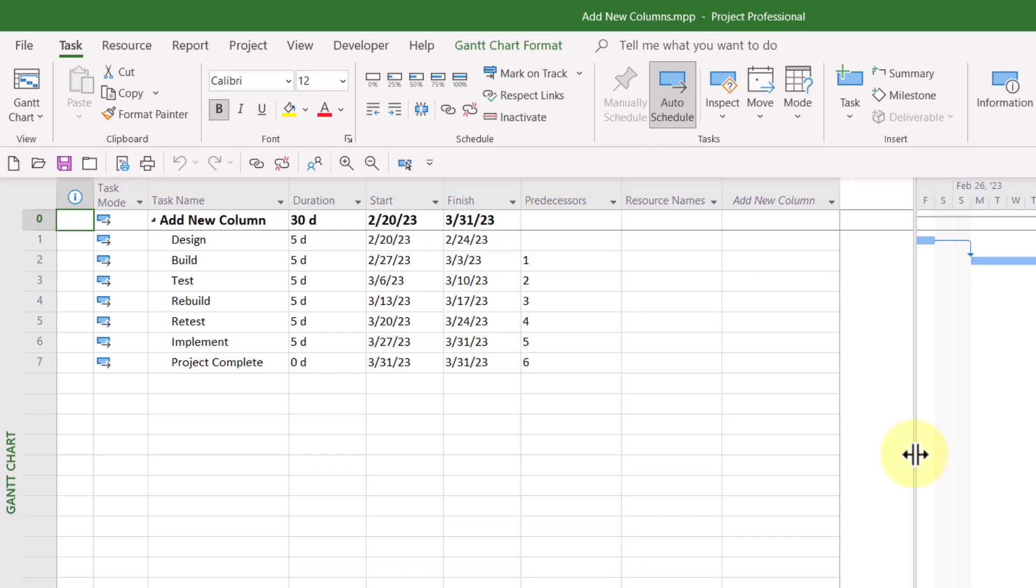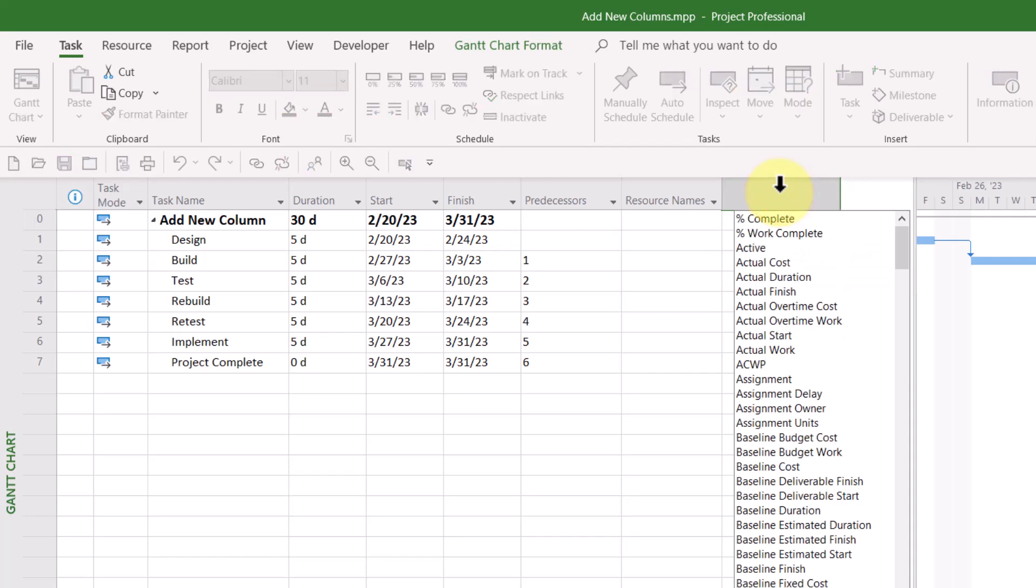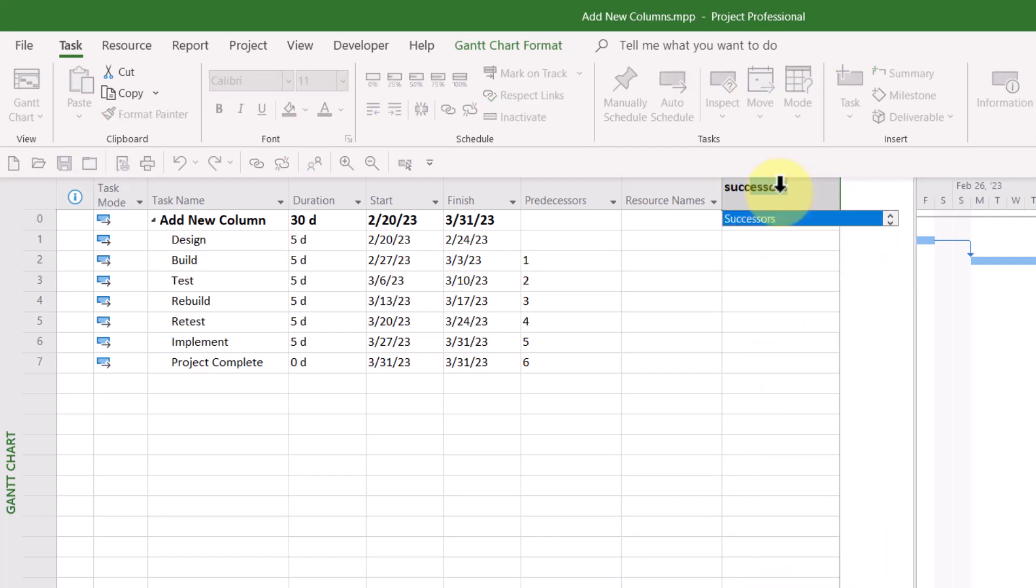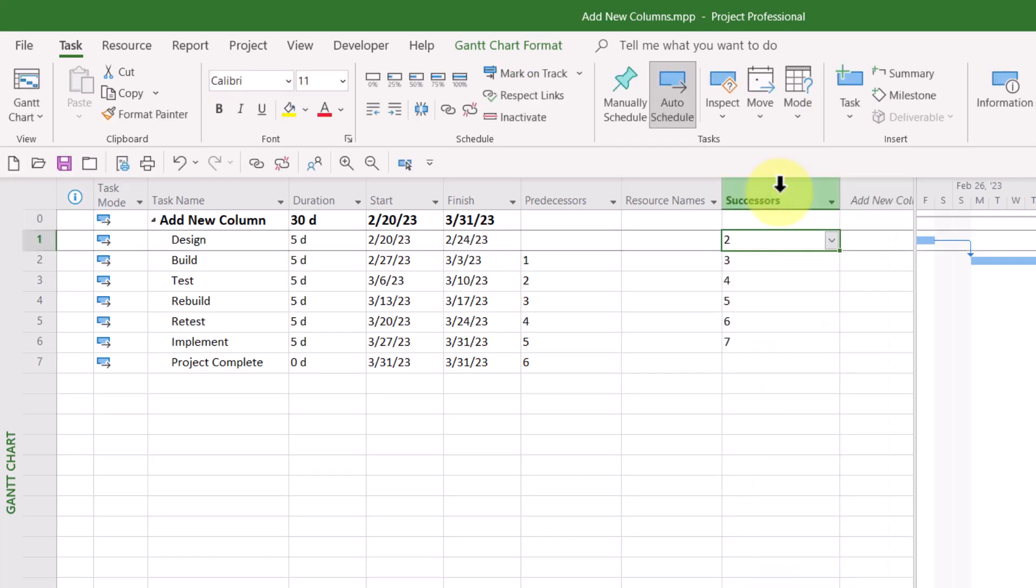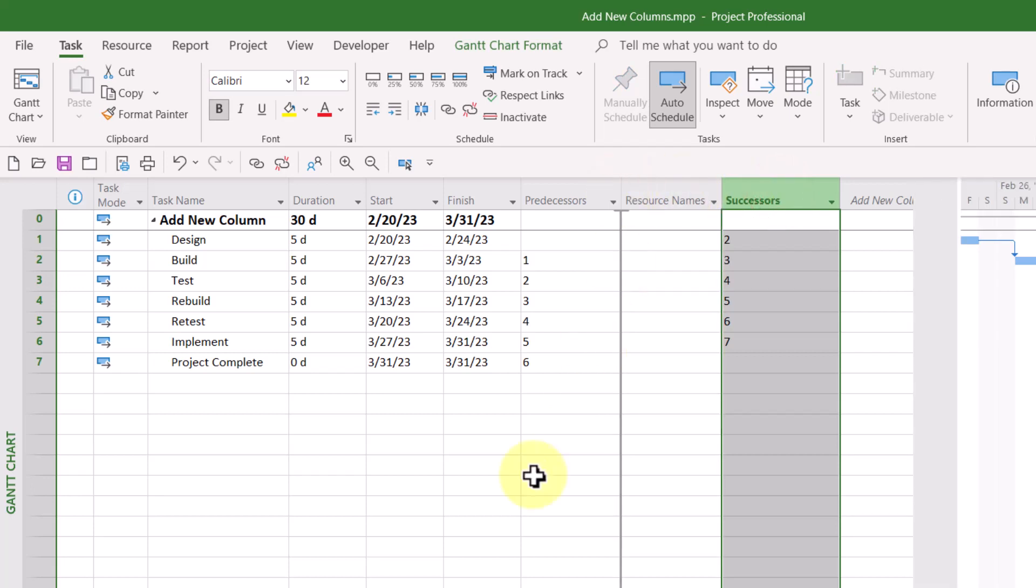Most people probably already know that if you click the column header of the Add New Column Virtual Column, you can select any built-in or default field that is available in Microsoft Project, such as the Successors field, for example. Once you've inserted the column you want, you probably also know that you'll need to drag it into place.